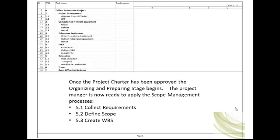The project scope statement is an input into the project management plan. The project manager will continue to define and refine the project scope throughout the planning processes and into the execution processes.